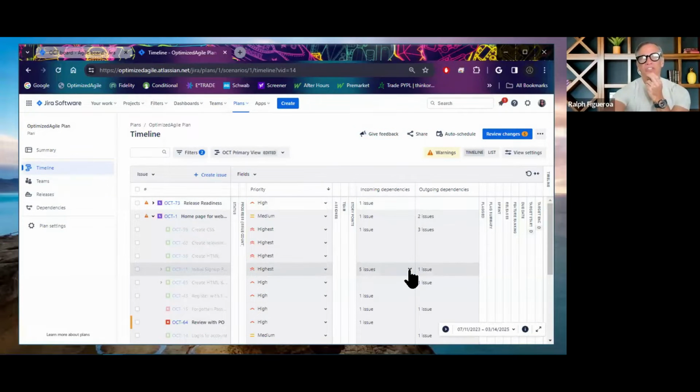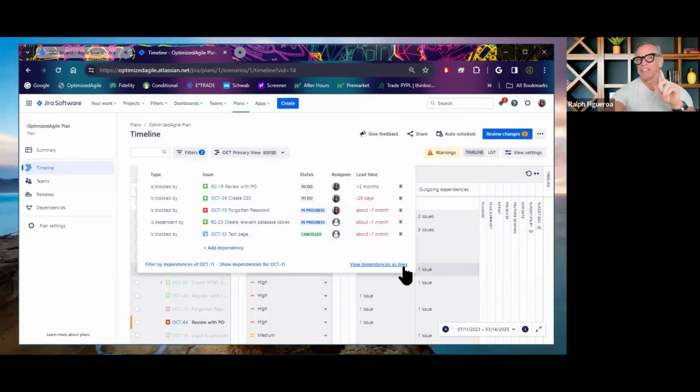Just by clicking on the down arrow, I can see that I have dependencies, and notice that the dependencies here are across the 2 projects that are built to make this view, right? So as long as you have access to those Jira projects, you can have inter-project dependencies called out using JAR. You could do that in Jira as well, by the way. But JAR seems a little cleaner because all the information shows up in a row.